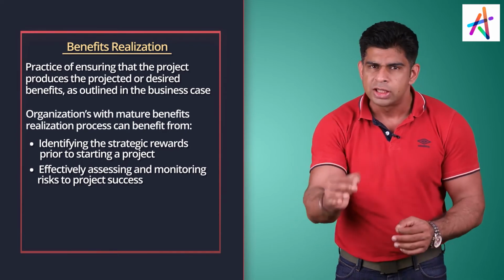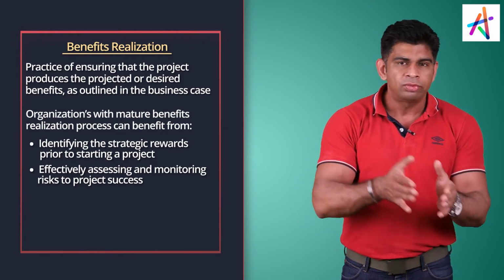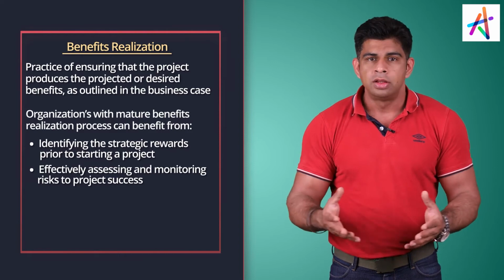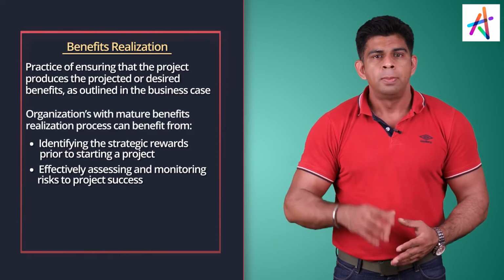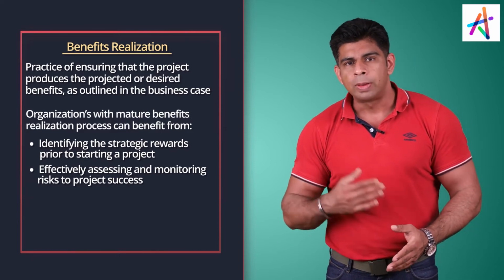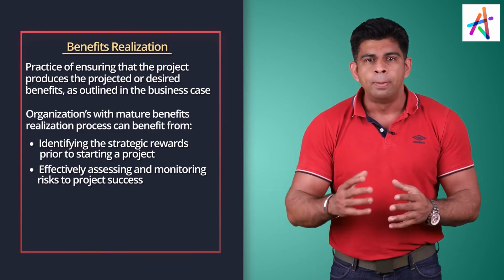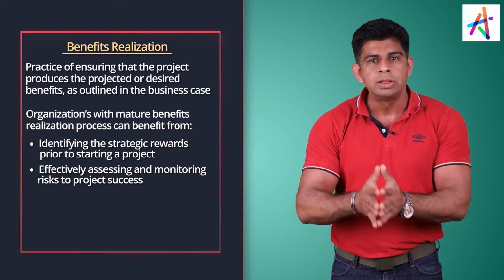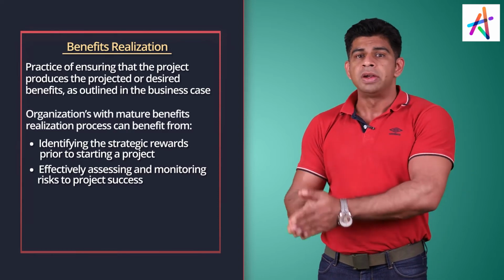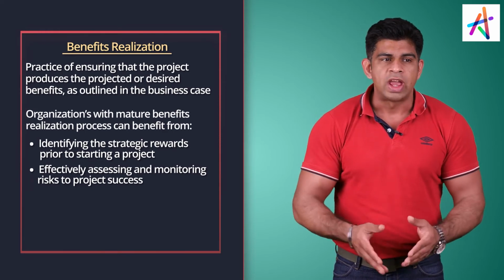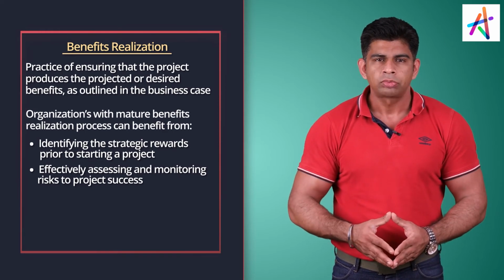Who is accountable? Is it the project manager? If the project benefits will be derived immediately after the project is done, then it could be the project manager. But often the project initiator, the person who's giving out the requirements, who's signing off, becomes the person responsible to ensure that the project delivers once a sign-off is given. So that's what we have for the benefit realization.